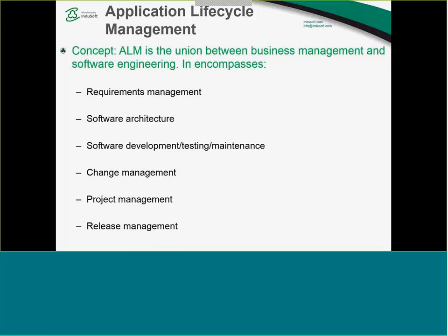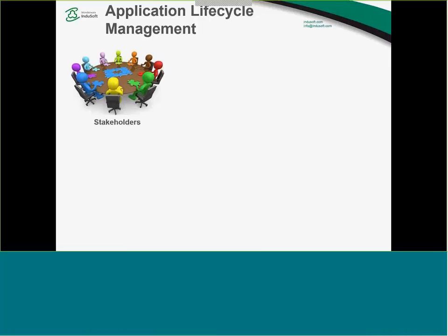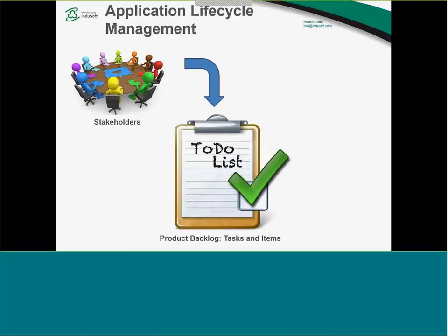And a very important portion of this solution, the application lifecycle management, is what we call the product backlog. So the idea, as in any project, is that you have your stakeholders, so pretty much the decision makers, your internal client, your end customer, that is going to provide you a list of requirements for this system, for this HMI, and with that, once you understand all the features that need to be in the system, the functionality of the system, you're going to create a big list of to-do items, or what we call the product or project backlog.